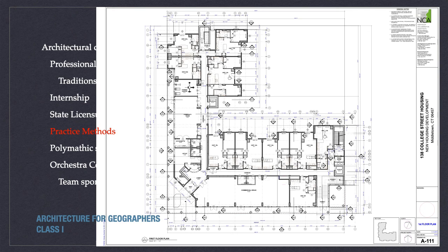An exaggerated, but kind of typical example is a mechanical engineer on the drawing could show ductwork that provides adequate ventilation for the space but no headroom for the people walking through. That's a kind of silly self-inflicted wound, but where the architect really has to come into play is making sure that each of the disciplines are coordinated with each other, that the ductwork isn't taking the space of structural equipment, that the fire ratings for penetrations for any of the mechanical types of things going up through the building are done adequately and provided by the architect's drawings.